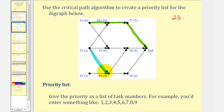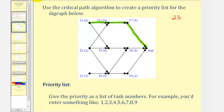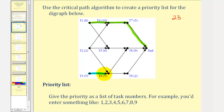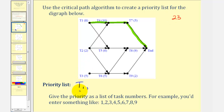From two to six to nine to the end, total time is only nine hours. From task three to six to eight to the end, total time five plus five plus nine — that's nineteen, less than twenty-three. From task three to six to nine to the end, that's only twelve hours. So task one is on the critical path, and we add task one to the priority list with a total time of twenty-three hours. Now we eliminate task one from the digraph and repeat.